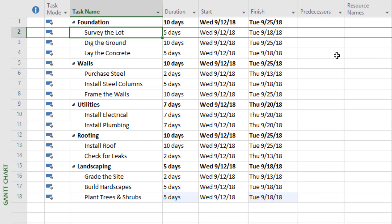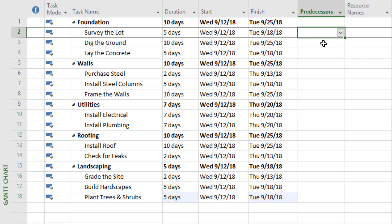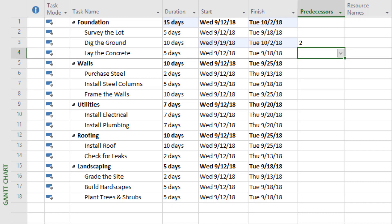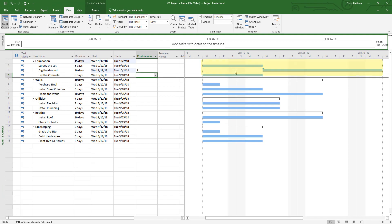Let's start with the foundation. Surveying the lot could be the first task on the project, so it wouldn't have a predecessor — there's nothing that comes before it. With digging the ground, though, we can't do that until we've surveyed the lot, so the predecessor for digging the ground is number two. In the Gantt chart, after we define that relationship, you'll see surveying the lot and digging the ground are now connected with an arrow.